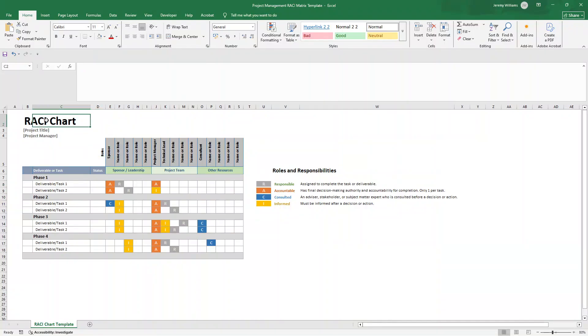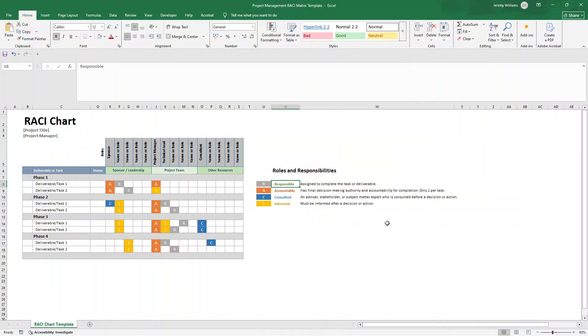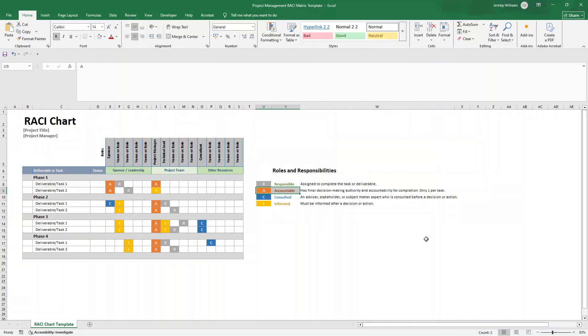RACI is an acronym and that stands for and breaks down as follows. R is for responsible. Basically, these are the people who actually do the work. They're the ones performing the task or activity. A is for accountable. This is the person who owns the outcome and makes the final decision. So they will sign off on the work and answer for whether it gets done. Now, this is really important. Only one person should be accountable per task.